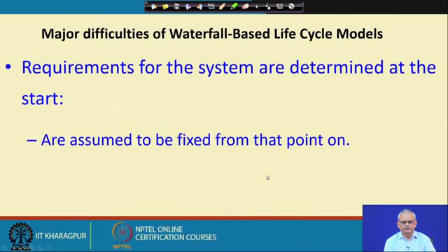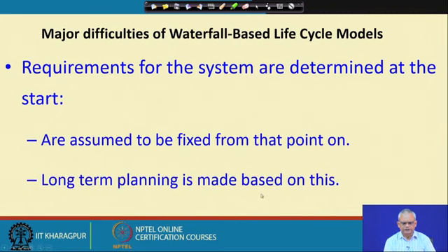But one of the major difficulties, I will say that this is one of the difficulties which is acutely felt, is that requirements need to be defined at the start, and from that point it becomes fixed. And not only that, the project manager makes plans based on the requirements, what are the phases, how much time the phases will take, and so on, and any change there upsets the manager's plans and it increases the cost to a large extent if any change is accommodated.